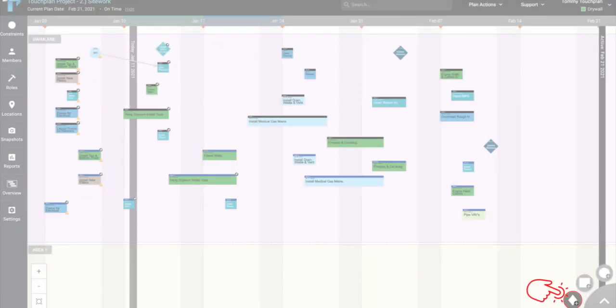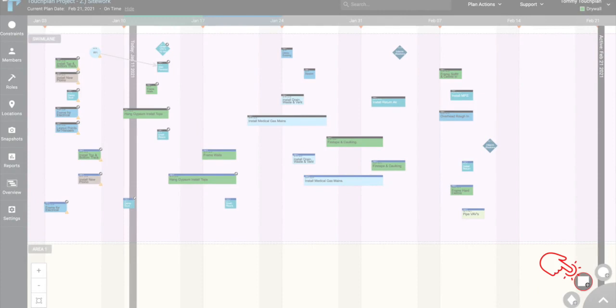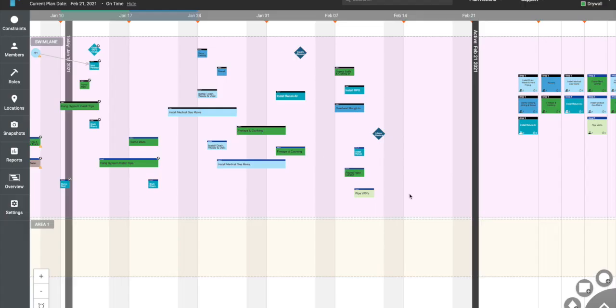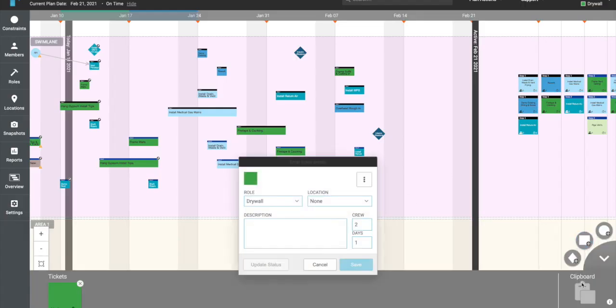You'll notice three different shaped icons on the bottom right-hand corner of your screen. The diamond represents milestone tickets, the square represents task tickets, and the circle represents constraint tickets. Click on any of the icons to create that ticket type. Enter the ticket details and click Save.